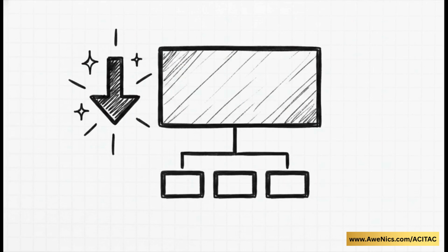And guys, this brilliantly illustrates the magic of MS Project. The absolute second you click that indent tool, something highly satisfying happens. A tiny expand and collapse arrow automatically pops up next to the top-level site clearance task. That little arrow, that's your visual confirmation. It means site clearance is no longer just a standard row. It's now an official summary task. It's a true level 1 WBS package holding all those nested subtasks safely inside it.